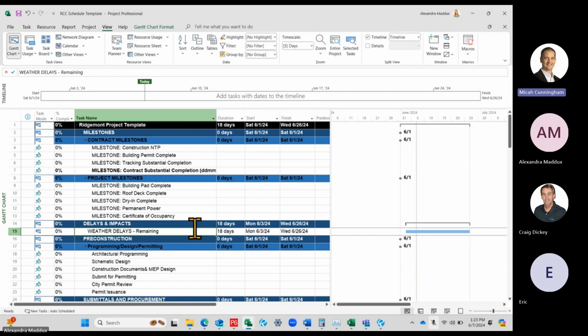So you could say March, April, May, June, all consecutive at the end. This weather bank at the end could be per month, but it still is all going to be at the end, or else it's going to just move around on you. I've had owners want that before, like owners want to see it, and it just doesn't really work.